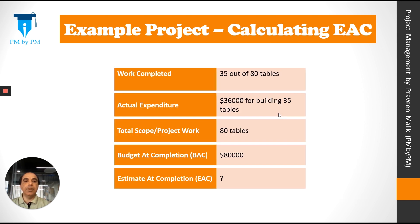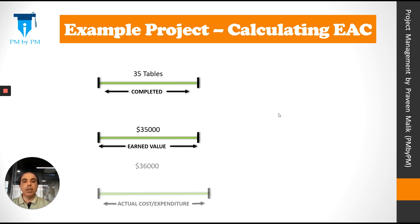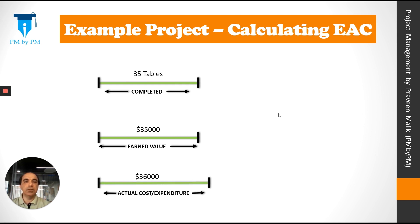In our example project, we have already completed 35 out of 80 tables and spent $36,000. We have to complete a total of 80 tables, so we need to calculate how much money would be needed. Let's calculate it using a series of pictures. We have already completed 35 tables; our earned value is $35,000 and actual cost is $36,000.